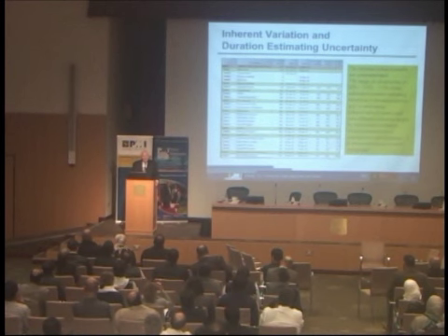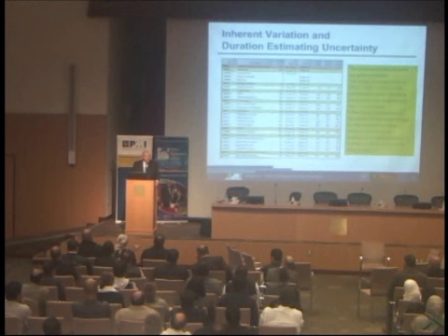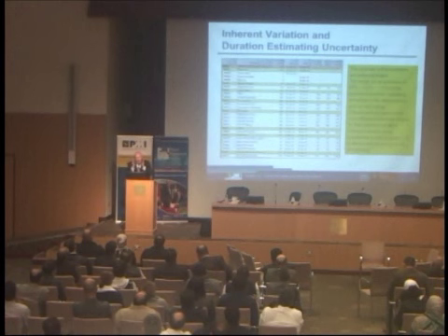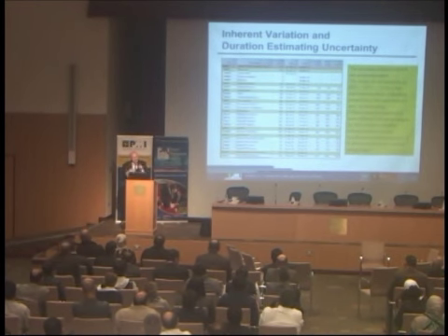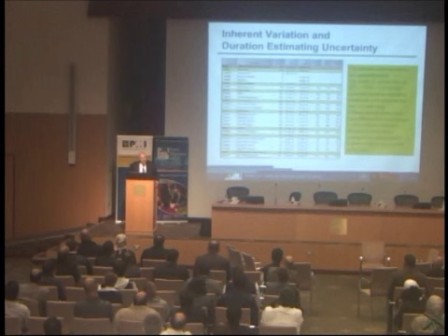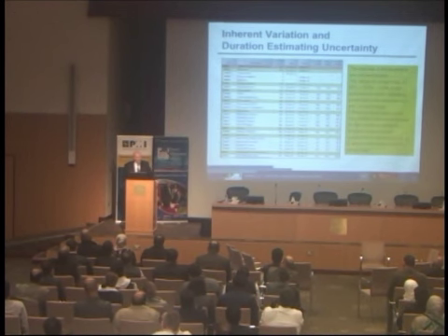So you may have what Primavera risk analysis calls templated quick risk, which means that I can separately code each of the main categories of activities and put different ranges of, plus or minus 5, plus 10 minus 5, plus 20 minus 10. Small ranges relating to the inherent variability of human and organizational efforts. And I might want to actually put in there as well